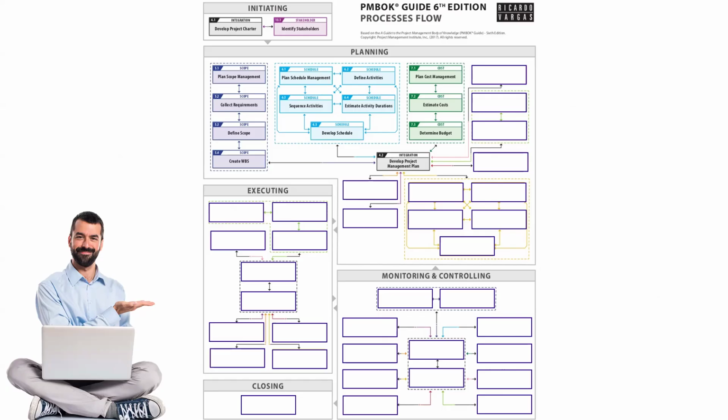Okay, when do the schedule baseline and cost baseline get created? Although it looks like the schedule baseline should be created immediately after the scope and then the cost baseline, it is not the case. As I said, all other areas which are going to be planned, like quality, risk and everything else, will have an impact on your cost and schedule, right? So we will wait for all other areas to have been planned, and their impact must be absorbed into our schedule and our budget. Only then will we baseline them. That means the schedule baseline and cost baseline would happen after everything in the project has been completely planned. Then we will get the final baselines for the cost and the schedule. And once that is done, the planning stands completed.